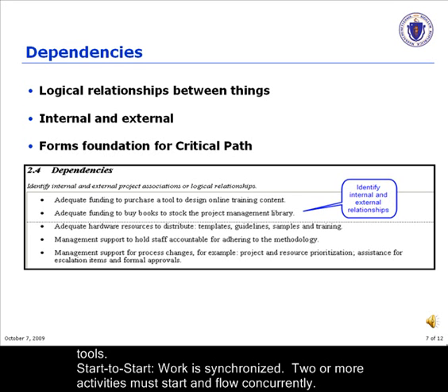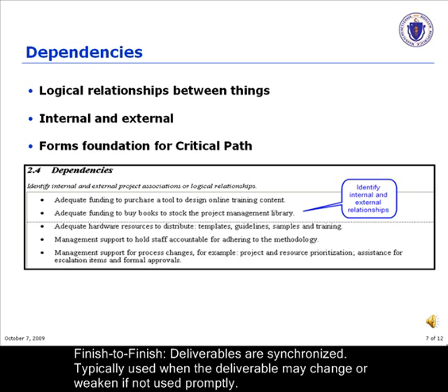Start to start. Work is synchronized. Two or more activities must start and flow concurrently. Finish to finish. Deliverables are synchronized, typically used when the deliverable may change or weaken if not used promptly.